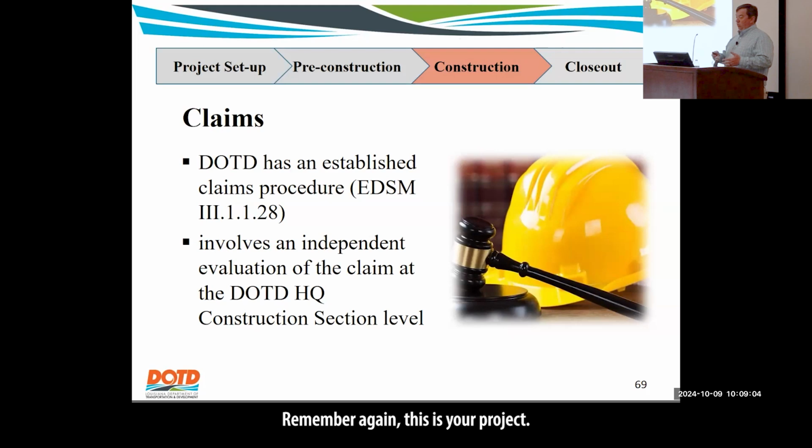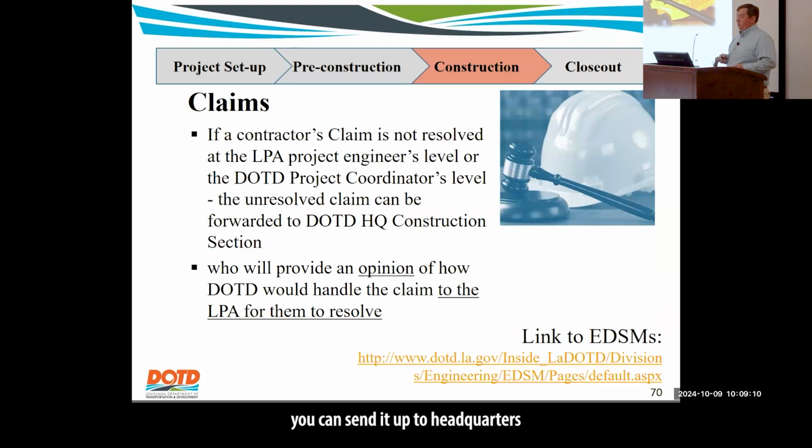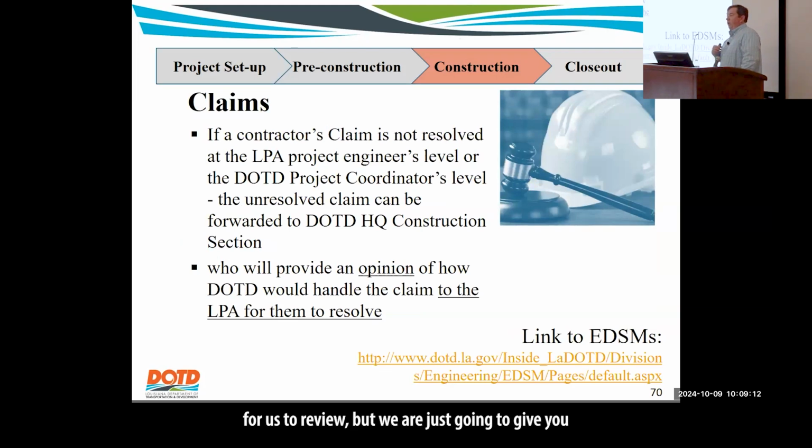Remember, again, this is your project. So if you end up getting a claim, you can send it up to headquarters for us to review, but we are just going to give you a recommendation because, again, it's not our contract. We'll review it, take a look at it, and say, all right, I see the contractor's side, and I see y'all's side.